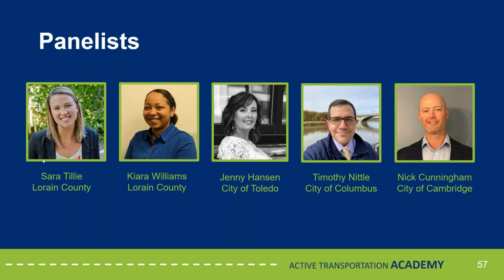I know that's a really good question. So like I said before, our infrastructure management team helped prepare the application. They did the initial estimate and schedule, and then design and construction reviewed it. And then once we received official notification from ODOT that we had been awarded the funds, there's a project handoff meeting internally from infrastructure to design and construction.